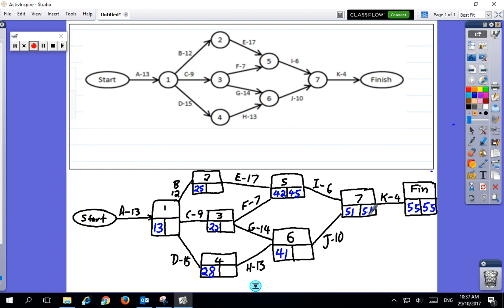If we go this way, 51 minus 10 would be 41. We can see our critical path starting to emerge, because there's no play time here. There's no twiddling your thumb times at all. Alright, from 41, we're going to go backwards this way because this one's more straightforward. 41 minus 13, 38, 28. Again, we can see no float time there, so our critical path is becoming secured. 28 minus 15 will be 13. And because that matches this, and there's no float time, this must be 13.